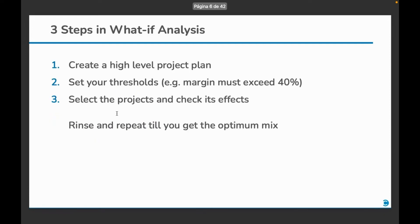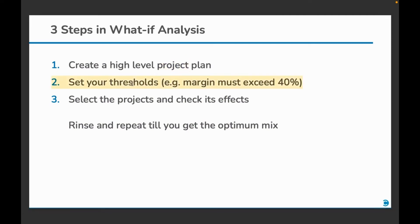There are three steps in doing the what-if analysis. You must first create a high level project plan for your request. Then, configure your thresholds. For example, you can set the project margin threshold to 40%. And if you select projects that cause your potential margins to drop below this value, you will be alerted.